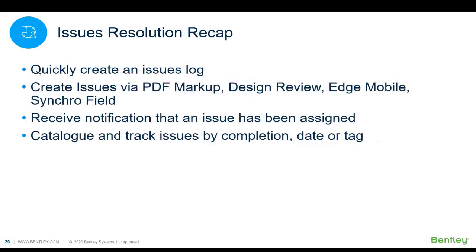Just to recap, our issues resolution gives us the ability to quickly create an issues log that is reportable and allows us to understand the different issues on the project. We've got numerous tools for creating issues, as you can see here. We can assign these issues to different individuals, and they'll receive notifications that they've been assigned an issue, and there may be a due date assigned with that for when you want to see those results back. And then finally, we can catalog and track issues by completion date or tag.